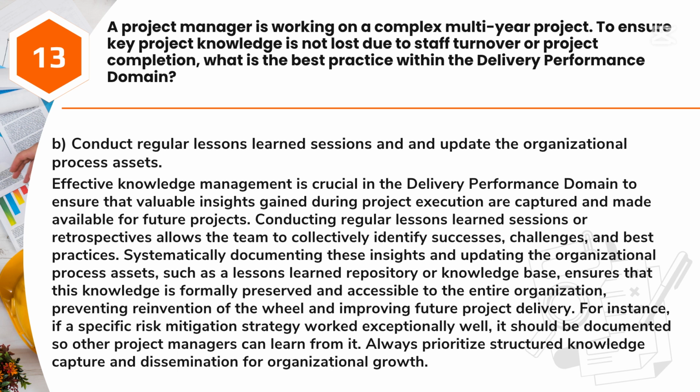Systematically documenting these insights and updating the organizational process assets, such as a lessons learned repository or knowledge base, ensures that this knowledge is formally preserved and accessible to the entire organization, preventing reinvention of the wheel and improving future project delivery. For instance, if a specific risk mitigation strategy worked exceptionally well, it should be documented so other project managers can learn from it. Always prioritize structured knowledge capture and dissemination for organizational growth.